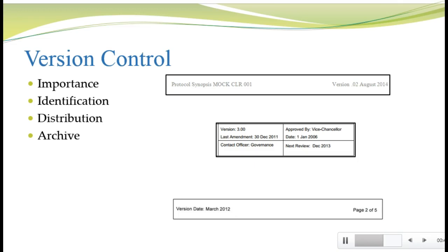Once you have each version identified, you need to make sure you distribute the new version to every team member and collect all copies of the superseded versions. This is harder than it sounds, but it's important. Some companies go so far as to prohibit printing of hard copies of project documents, which allows them to ensure only the newest version is available online. But you need to keep at least one copy of the old version and archive it as part of your overall study documentation. Make sure you know what the SOPs for version control are for the company where you're working.